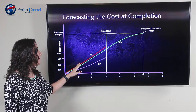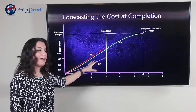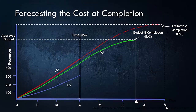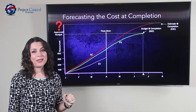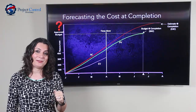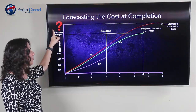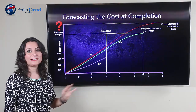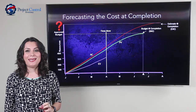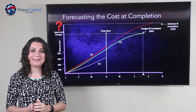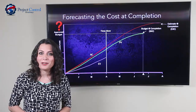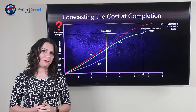By 'cost at completion,' I mean: based on our performance to date, our spending, and our plan, what would be our cost at the end of the project? In Earned Value terminology, this is called Estimate at Completion, or EAC. That's what we are trying to estimate — how much money we need at the end of the project based on our performance to date.